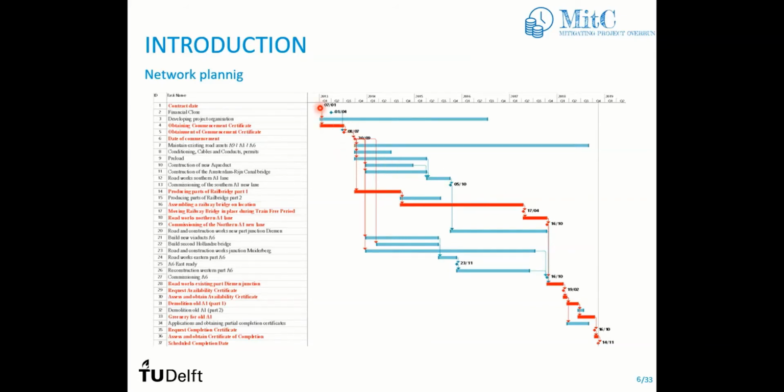So the duration of your project is from this point right here, the beginning of the first critical activity, until the end of the last critical activity. Usually we take special care of activities on the critical path, because if you have any delay in those activities, then your project is going to be delayed. That's why you hear a lot about the critical path. You have to really control those activities, make sure things are going as planned, more than other activities which are not critical.